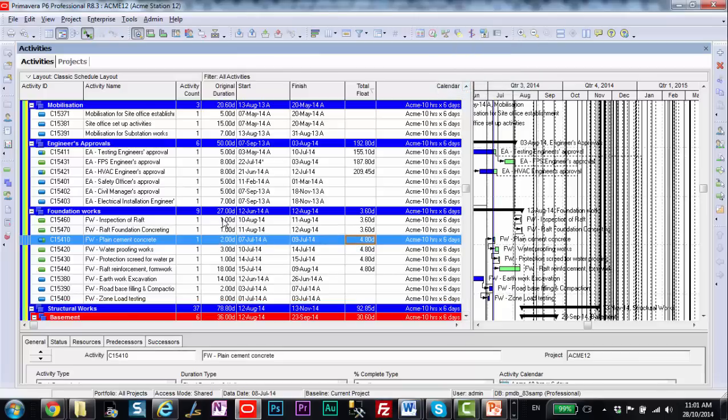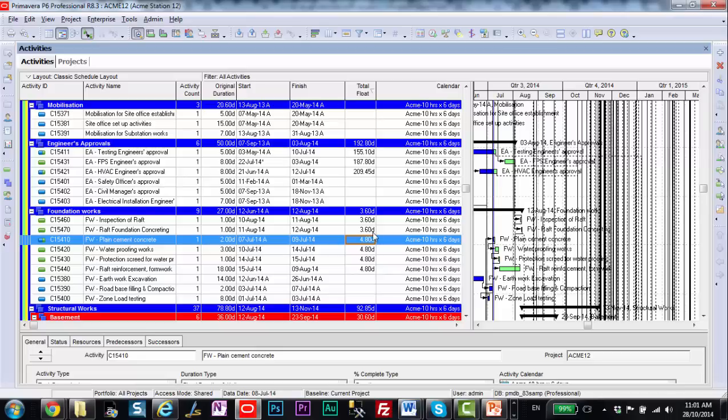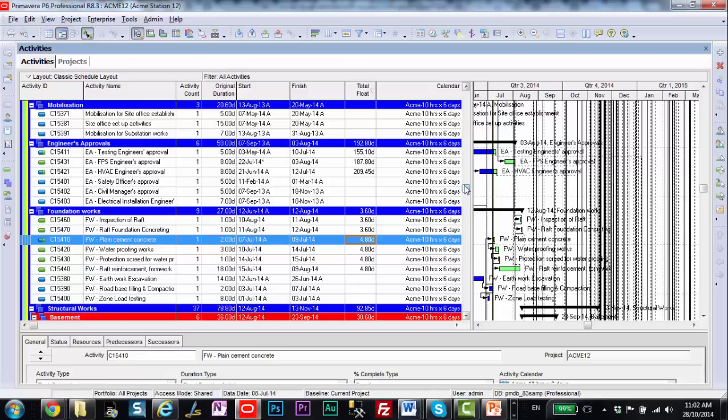And let me show you what happens when I switch this calendar back. I'll just do a fill down. Have a look now. My values are back to whole numbers. So displaying those decimals can lead you to find inconsistencies with your calendars as well. And I think that's what's going on with these total float values. Some of these calendars start at different times of the day. And we're using a few different calendars in the project. So, in uncovering things in your project schedule, decimals matter.